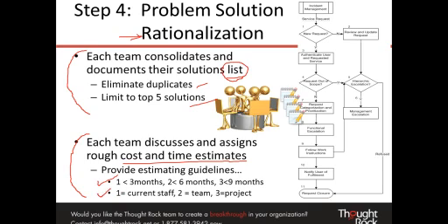And tell me how many people are going to be involved or how much resource do I need. If you do it with the current staff, or you might have to augment things into a team, or maybe you need a formal project, it gets bigger. And bigger always means you're not going to find the quick wins because you're setting a long-term plan. So typically what I find in the problem solution part, the initial solutions that you come up with tend to be longer term and bigger in scope. We need a new ticketing tool. We need some type of documentation management tool. We need more staff. These are all big things which aren't going to be quick wins, and it's going to be hard to sell to a management level.